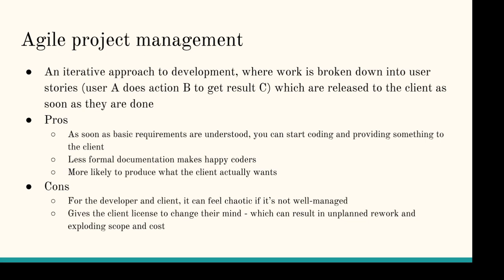These new things that you're asking us to do, you might have a 30-minute meeting with your senior developers to say, how long would it take us to do this? Let's estimate the scope of this. Then you say to the client, these new things you're asking us to do are going to take 5 days. Do you want us to take those 5 days in this sprint and take 5 days of work out, or do you want to postpone?